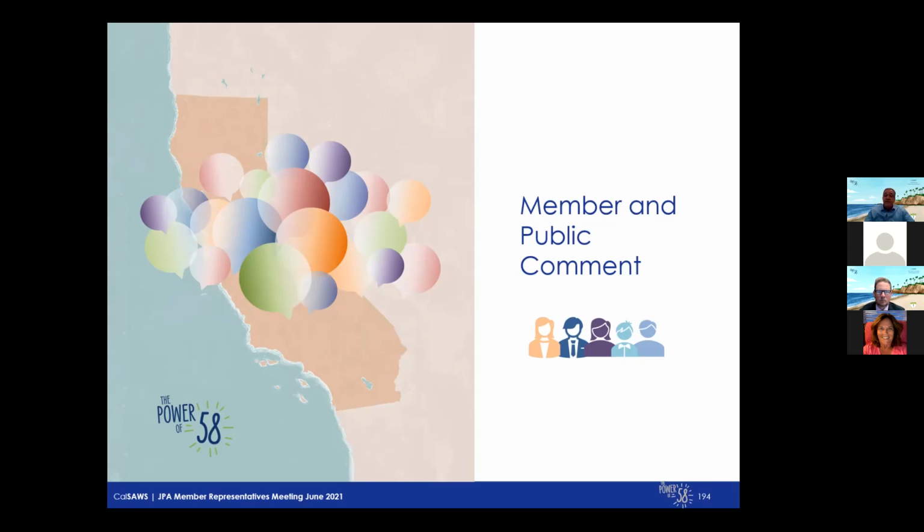It did have a little bit of an impact on schedule, but we think we're going to be able to make up that time. We will be reporting back at the next JPA meeting in July on the outcome, because we are tracking a risk on that. The impact of that risk, if realized, could be substantial. But the team is tracking through it and making adjustments, and we think we'll be able to mitigate that, but we need the proof. That's why we're testing every single day to mitigate that risk.